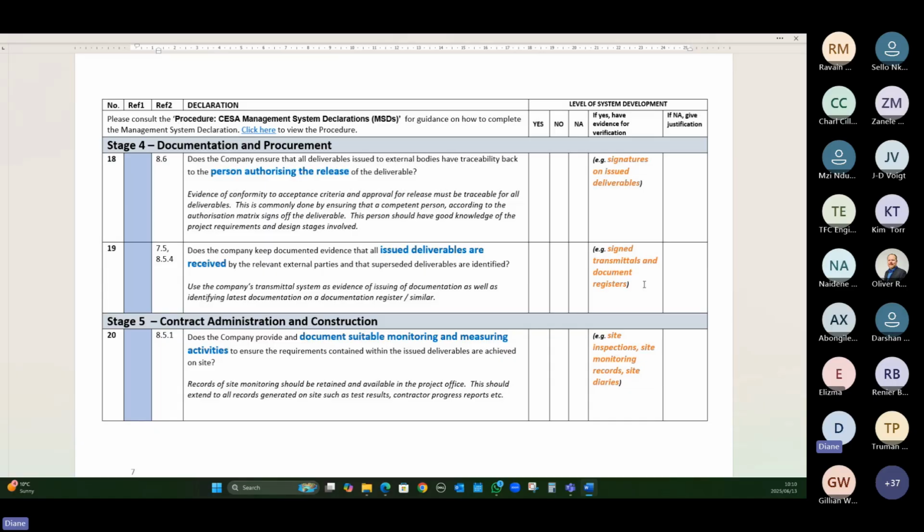A nice creative way that I've seen with companies doing, especially when they have to do hard copy submission of tenders, they've got their date stamps on their smartphones. So they take a photo of the tender going into the box. It gets date stamped. That's evidence that that document was delivered on the correct date at the correct time. So very important is have evidence of that.